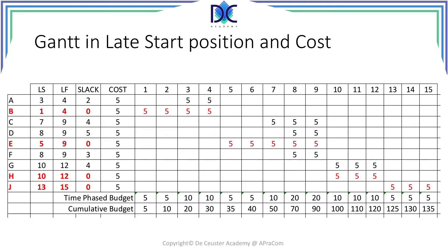The end cost at period 15 is still the same, but the cost in period 1 is not the same anymore because we moved activity A to its late start position.